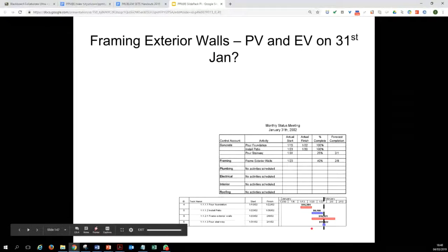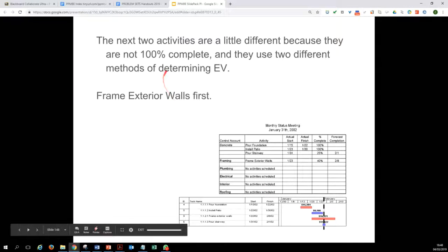So Kevin, half it, yes. So approximately, we basically break this bar and we just look at how much we should have spent of this portion of the bar, which is on the left of this reporting line. So we should not be looking at the entire bar. The planned value for the entire activity was 16,521, but we should only be looking at the portion of the bar which was on the left.